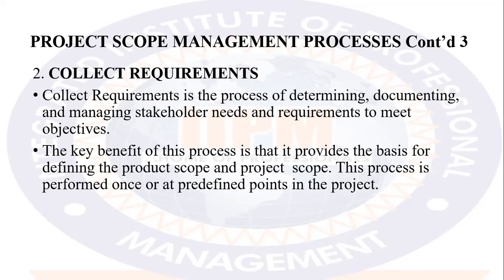Usually, in the olden days, the architect was the master builder and the project manager. But now with project management on board, some clients would either commission a project manager who would assemble the technical team, or the architect who would also act as the project manager and get the other professionals. That's step one. Step two, the architect will consult with you, having you give him a letter of commission and pay some initial fees for sketch drawings.